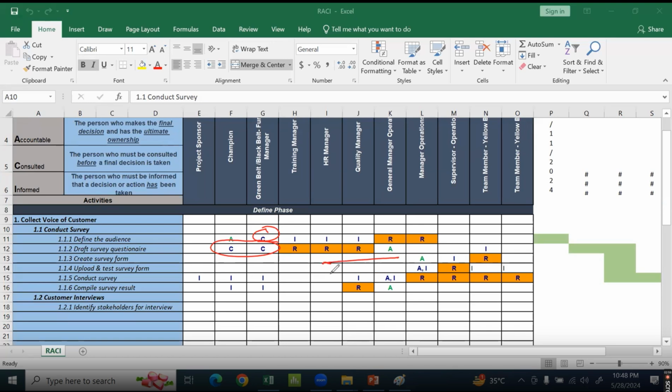Consultation is not necessary. Who needs it? The responsible. When the responsible feels that the job looks very tricky, I might need some guidance from somebody expert. I can choose somebody as my consult, and there can be multiple people consulted. It's okay. It's like taking a second opinion.